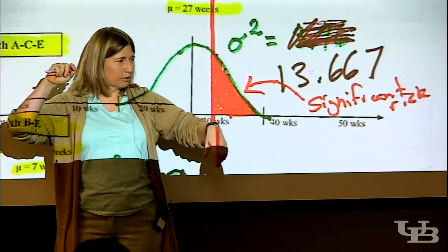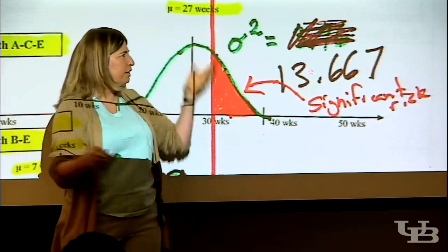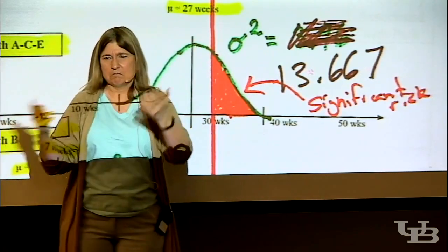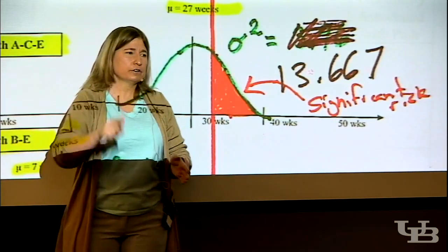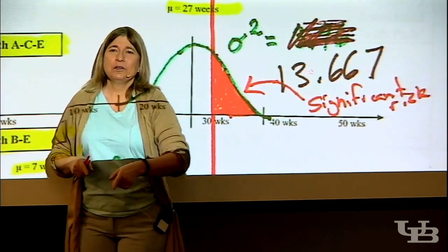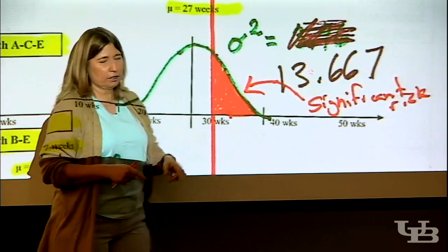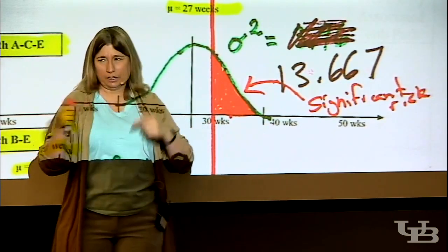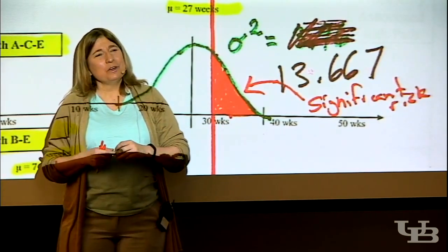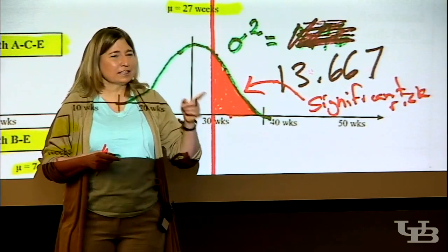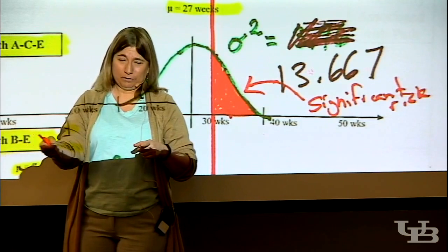That's your standard normal curve. Yes, you said, okay, well, what good? We don't have any path here whose normal distribution looks anything like that, a center of 0 and a variance of 1. True, we don't. But we do have a table that tells us that if you cut that curve at a certain point, exactly how much is to the left, exactly how much is to the right. That's what we need to know. And we do have a way of translating any curve into a standard normal curve.